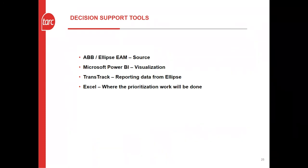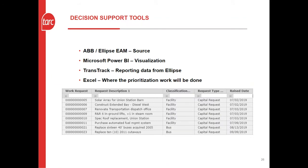Our asset record resides in our enterprise asset management system called Ellipse. Ellipse offers powerful data management tools, but sometimes we need to use data more readily and flexibly — for that we're going to be using both TransTrack and Power BI within the year. Even with Ellipse and the new reporting tools, Excel will play a big part in our prioritization process because of its flexibility. The first step for every project is entry into a capital request screen in Ellipse, which will remain true indefinitely because it acts as a constant record. Following that step, we move directly into Excel — first with the risk assessment group, and then a separate project prioritization group. So two separate groups of people within TARC.